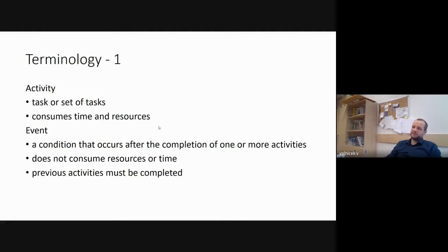This is very similar to process planning, in that there are activities which are carriers of the work, and there are events which basically serve as the boundaries. There are starting events, because if there is no starting event, the activity will never start, and there are end events, because without the end event, the activity will continue forever.